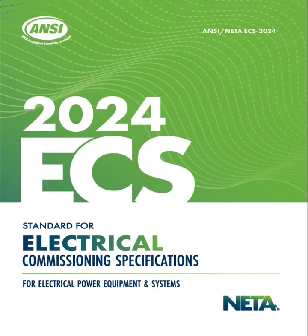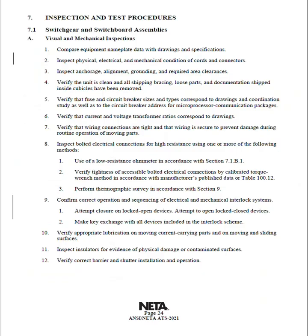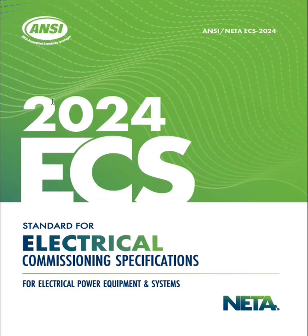Now I want to be pretty clear about this, and I've seen this get confused a lot. There's a lot of people who think that if I go out there and I do a no trip check on a differential scheme, that I'm commissioning that gear, and that is not true. That is a functional check that's required in the NETA ATS for your differential schemes. But that is just one of many things that is required to electrically commission. That is not actually commissioning. That's just a functional check.